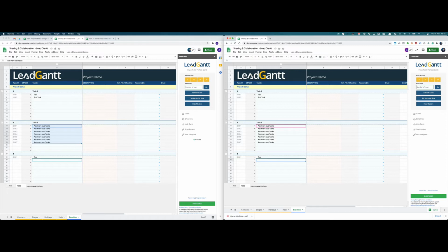I would suggest, for best practice, that one person creates the entire project plan. Once the project plan is created, or whatever the plan of execution is, you've got all the steps in there, and that's when you start sharing with people, so that instead of people coming in and adding more tasks or adding sections to it, they are actually doing more stuff to update their progress on it or leave comments for something.